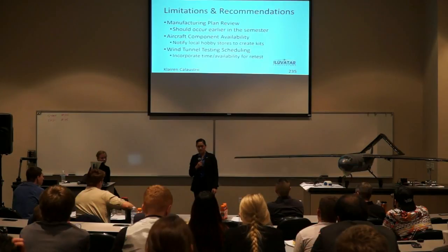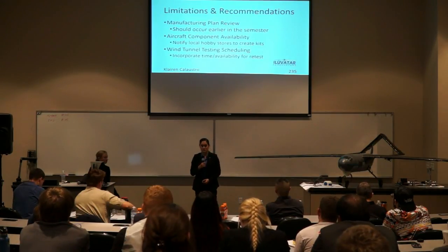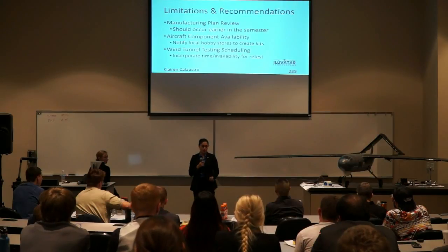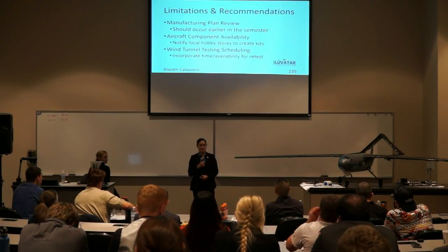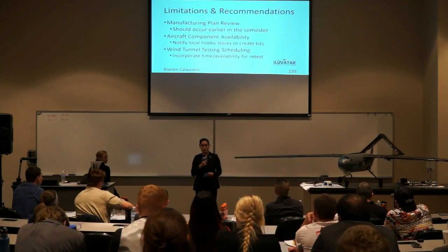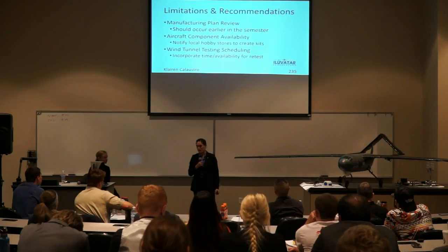Aircraft component availability: there is a local hobby shop, but they are limited to what they have, and so it was difficult when we found out we needed a new component. We had to order it and try to rush ship it. They suggested to us that if we let them know ahead of time what we're going to need, they can make us a kit with all those supplies, and that would be really helpful.